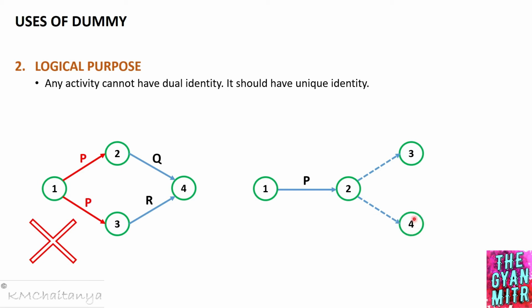So this is very important to keep in mind that whenever there is a split of an activity using the dummy, it doesn't mean that the resources and the duration will be split. Whatever is the resource consumed or the duration consumed by the predecessor activity before the use of the dummy, the same value will be moved through this dummy.